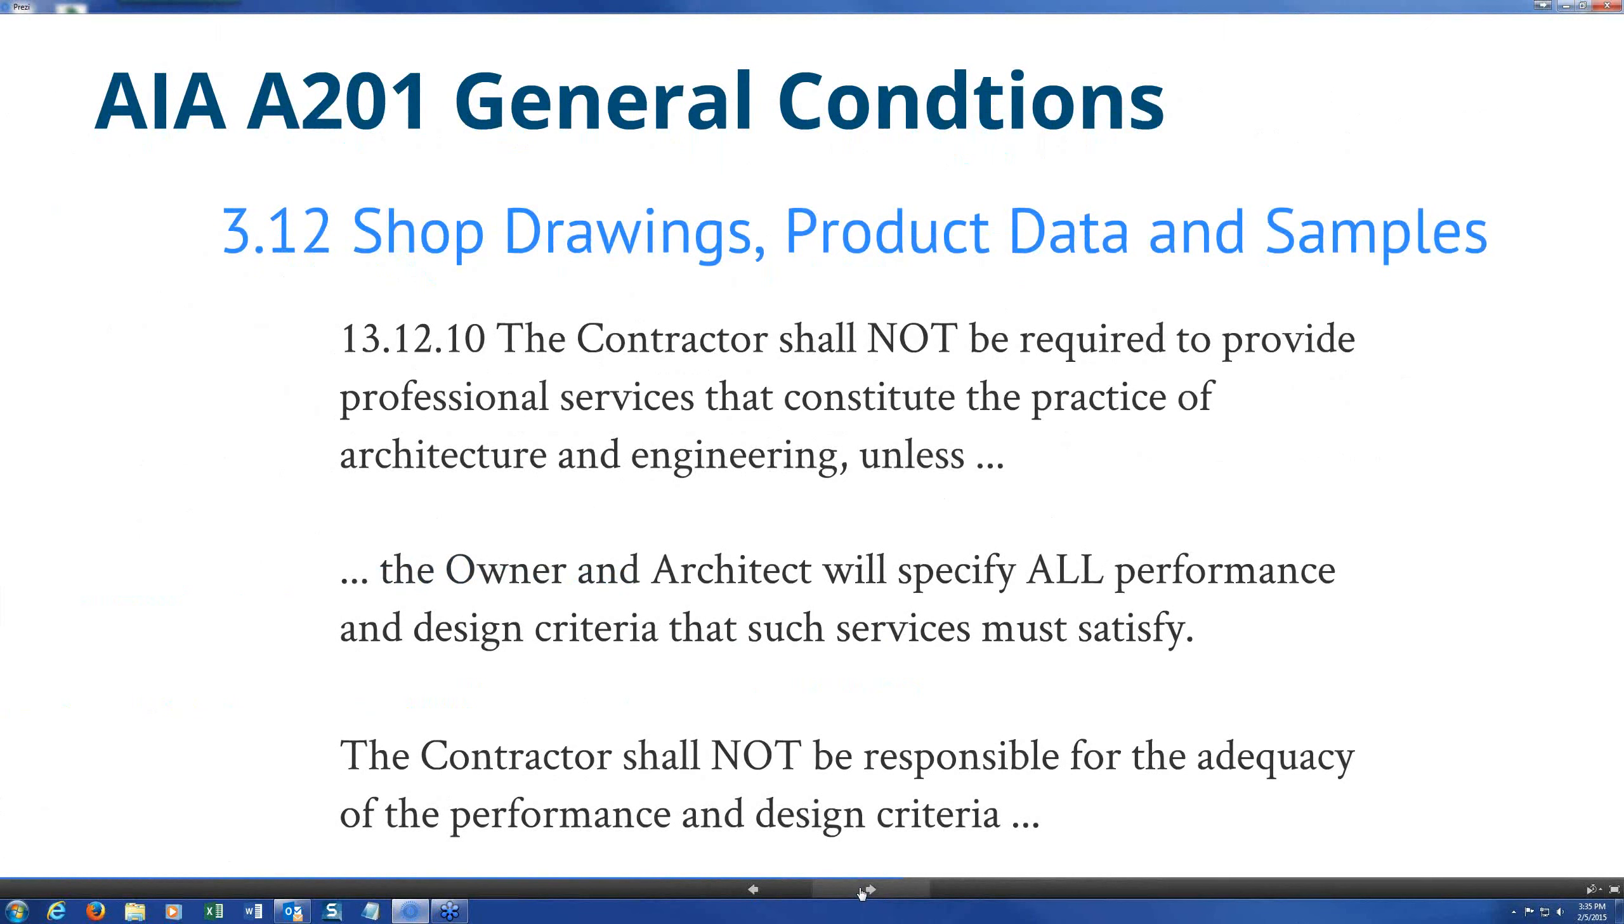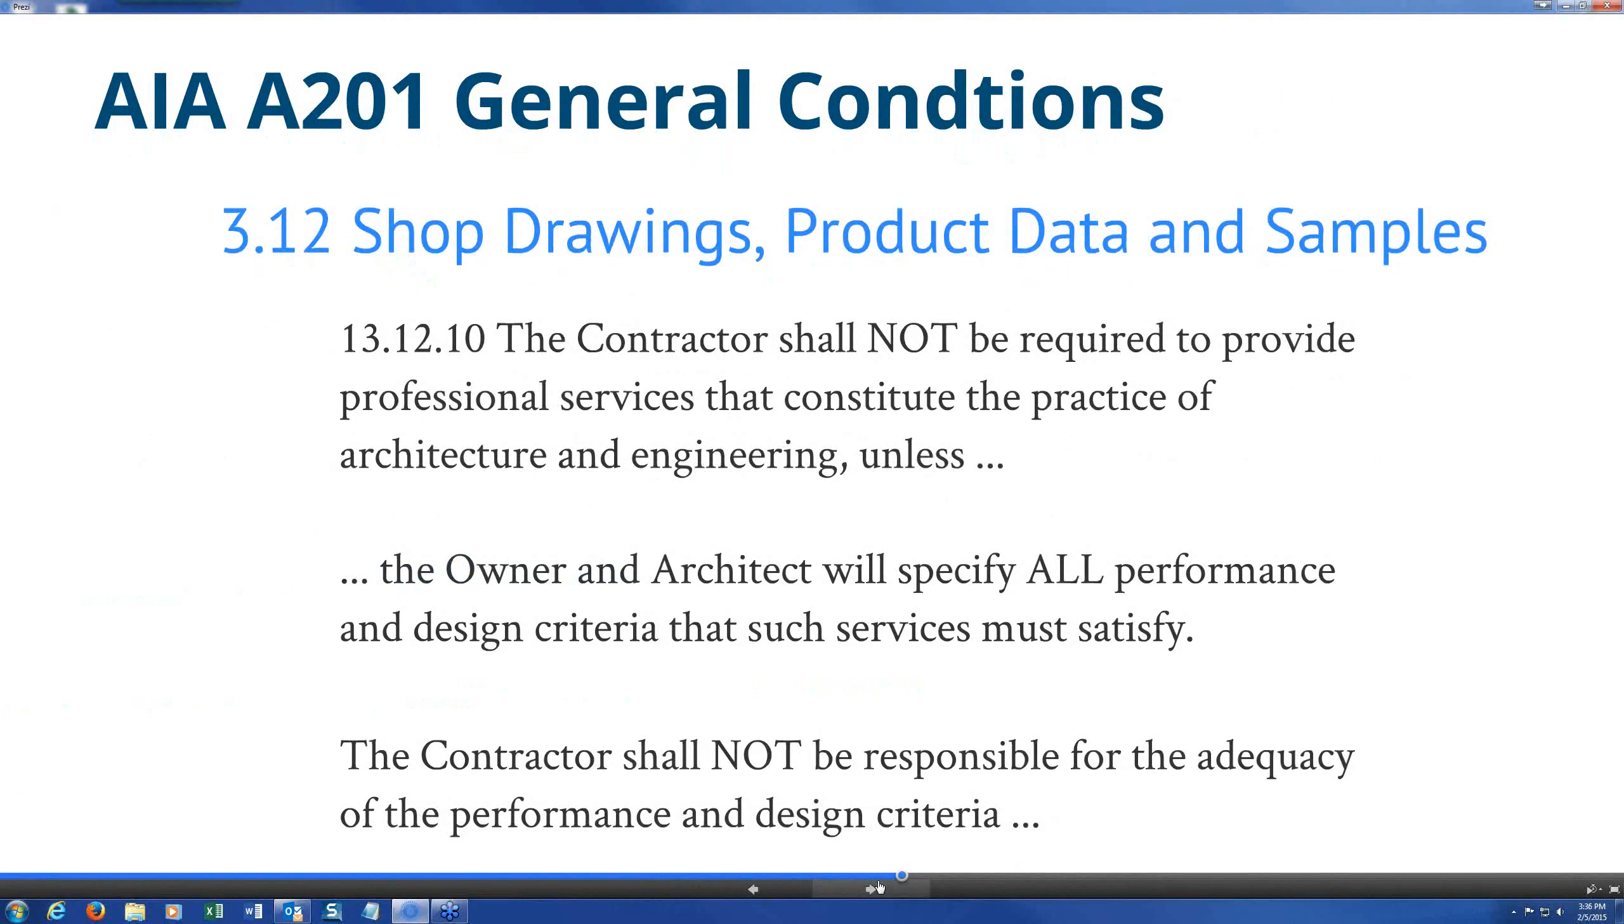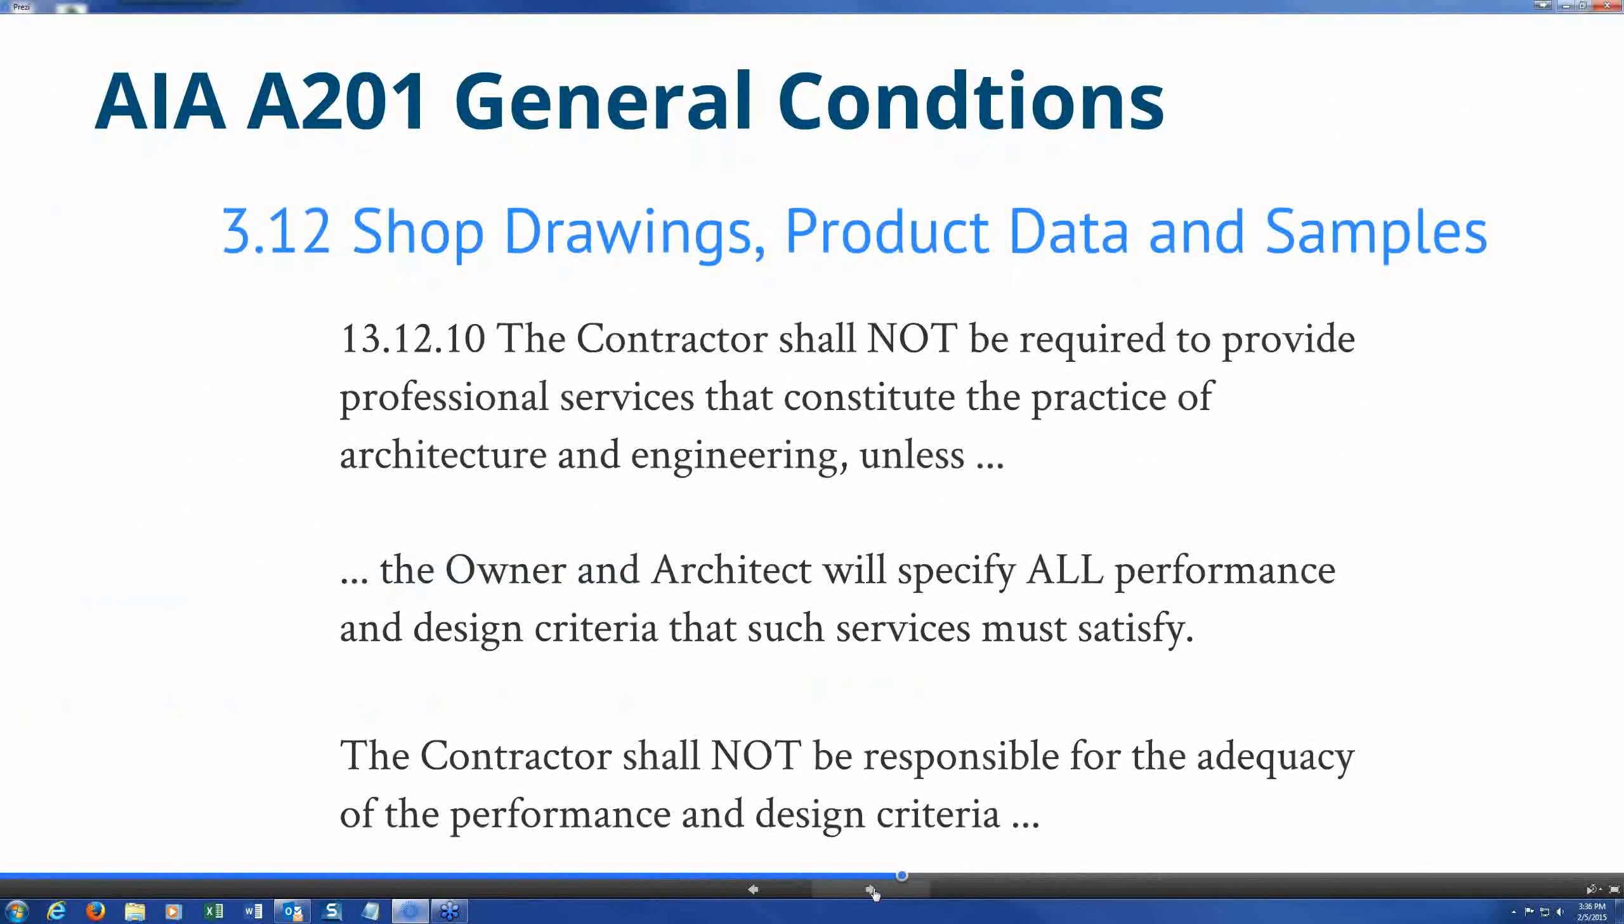So the general conditions really put some limits but then allow the contractor to be able to provide the design because it's saying that the contractor is not required to provide anything that would be constituted as professional services unless, and that unless is if the contract actually requires it, specifically requires the contractor to provide that service. So when the specifications do include the requirement for delegated design, the owner and architect are responsible because the contract is between the owner and the contractor. They must specify all performance and design criteria, and that has to be enough for the contractor to actually provide the design service. And again that goes back to the concept of the design professional in responsible charge who is responsible for coordinating all the work of the project to ensure compliance with the building code.